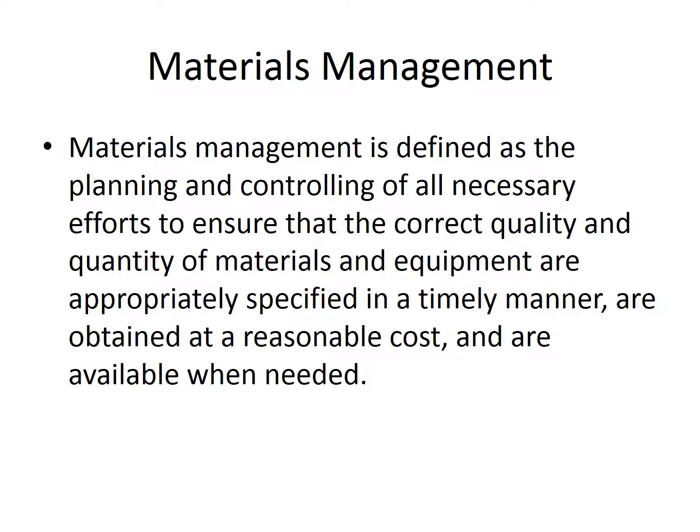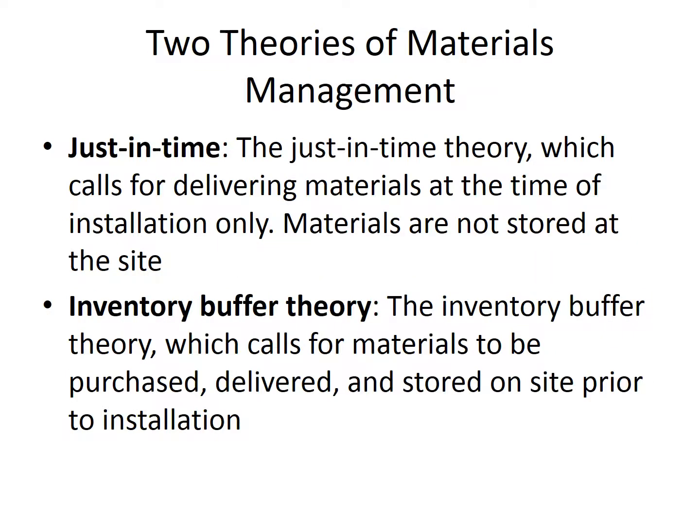Now, there are 2 different philosophies for this. One is referred to as the just-in-time theory, which calls for delivering materials at the time of installation only. Materials are not stored on the site, and this is probably relevant. There's 2 different examples I've given here with pictures. One is highway construction, another is kind of like a downtown urban job site. Now, just-in-time materials management applies when I have limited space for laydown.